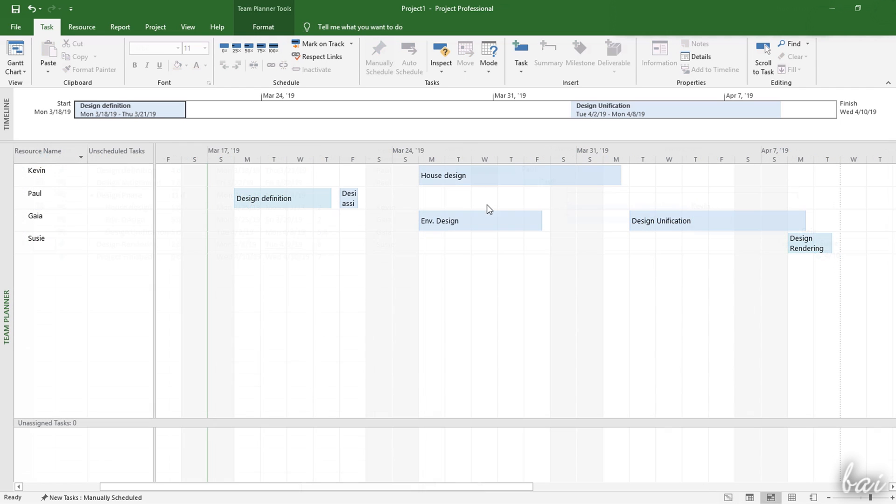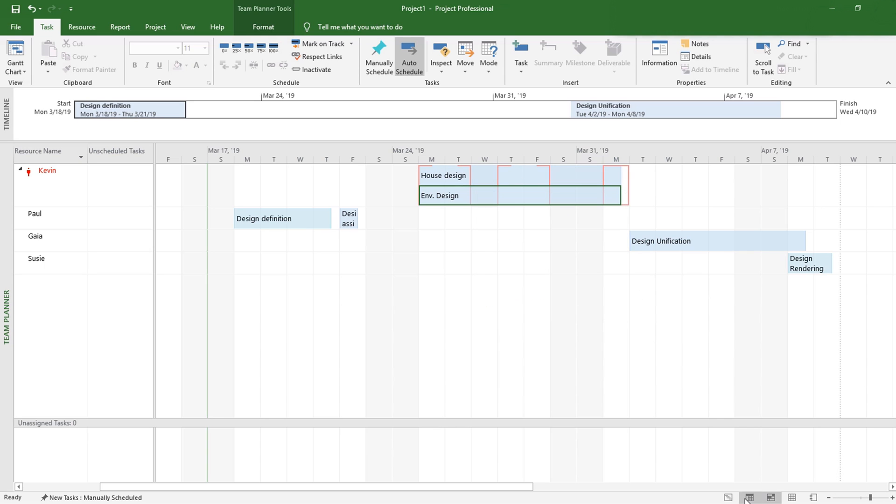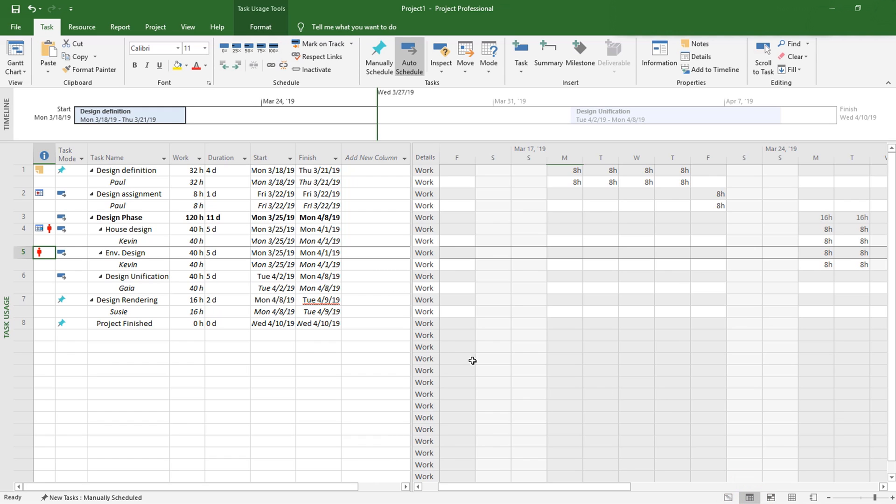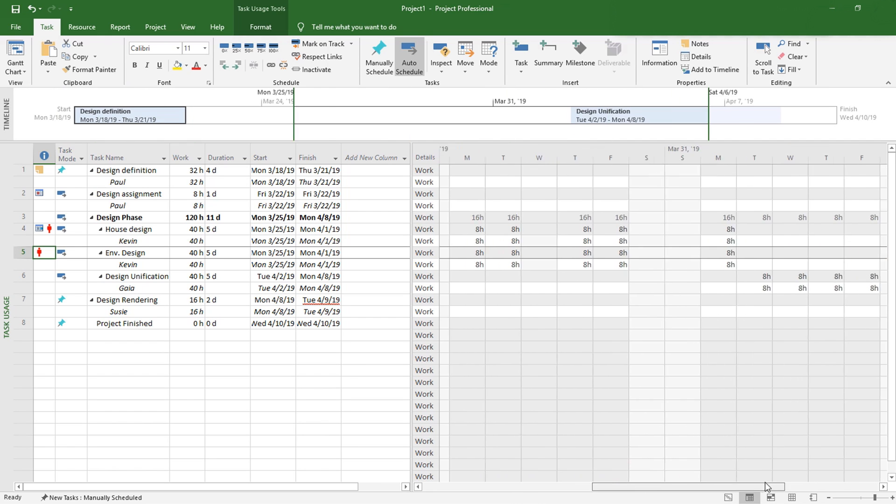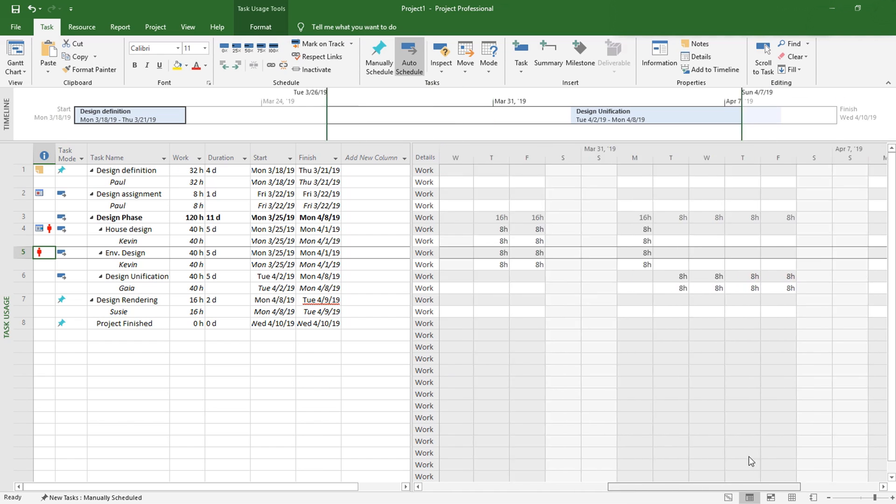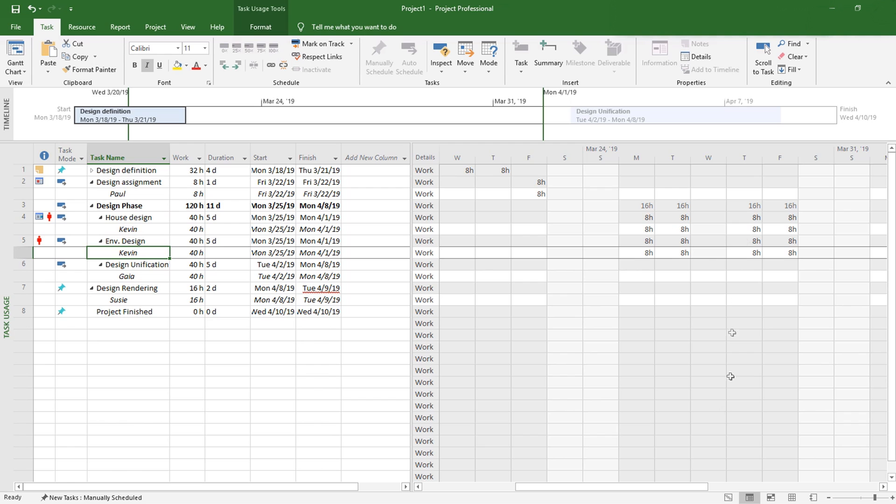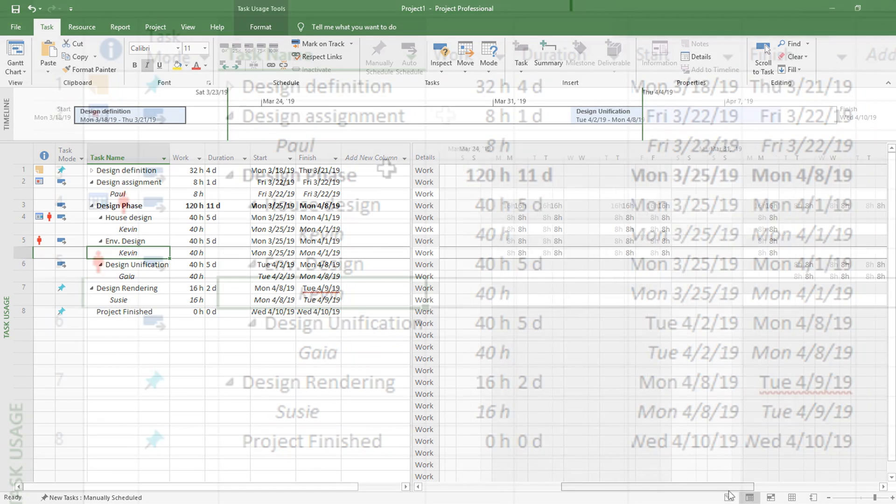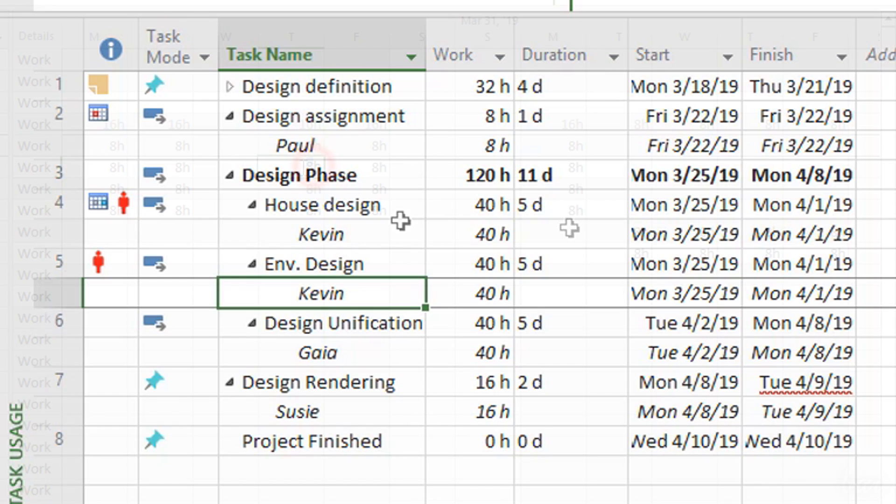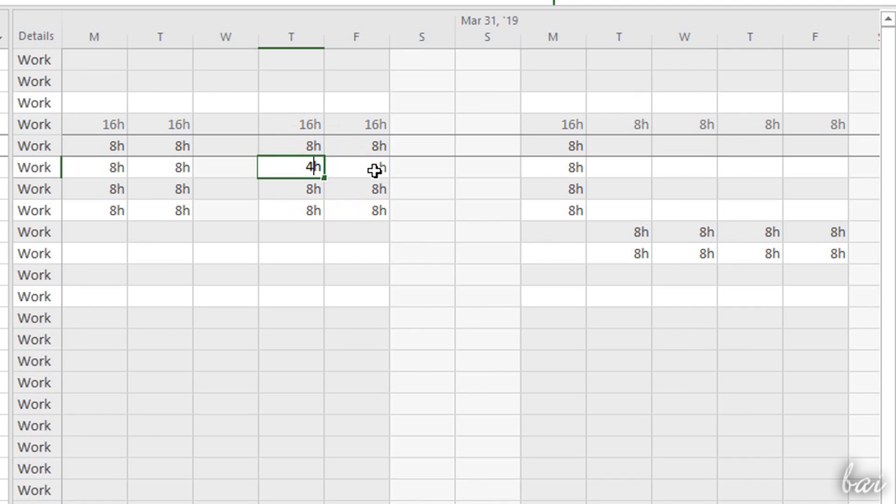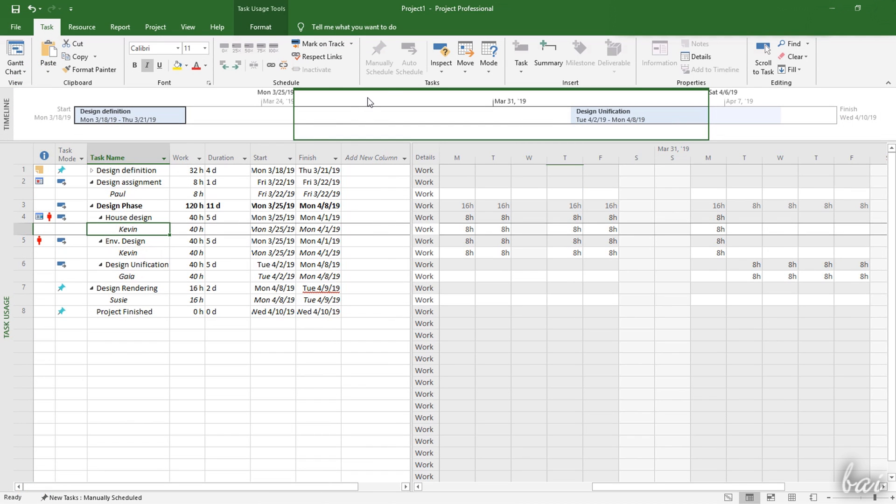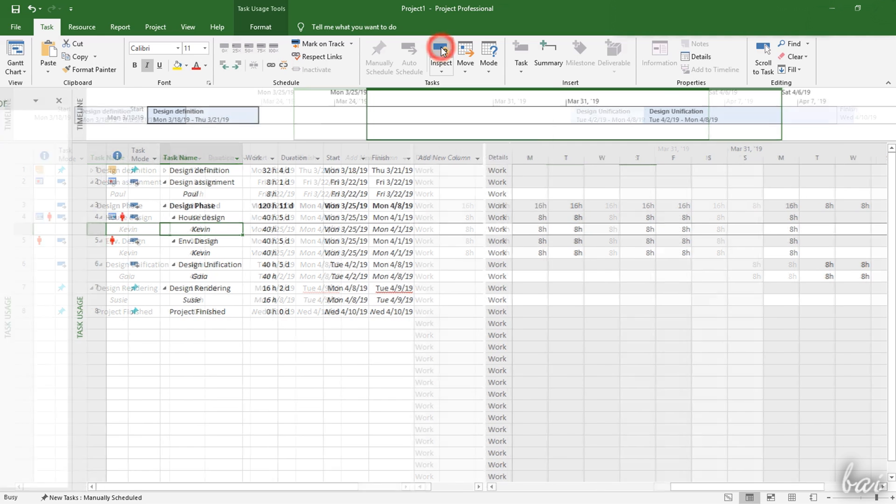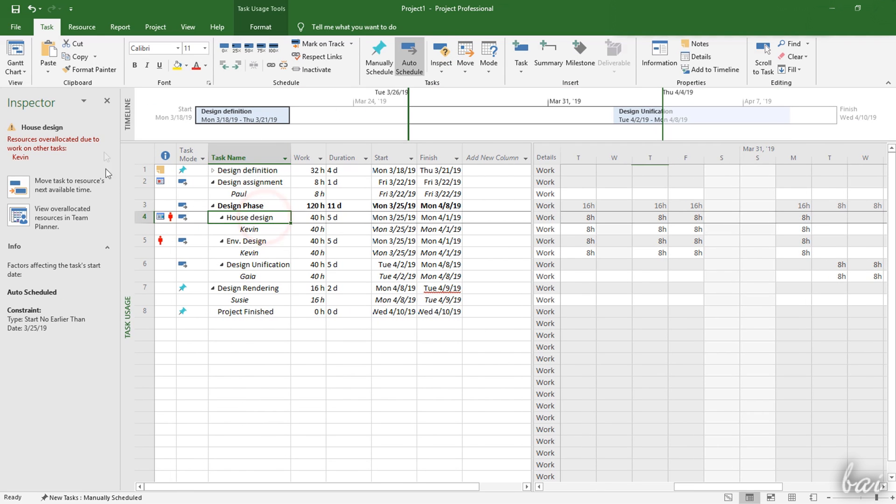In case you make bad assignments, for example when tasks meet holidays or when over-allocating resources, red contours appear. The over-allocation can be resolved by using the Task Usage workspace. This workspace is used to distribute the tasks between the resources, considering the limits defined for the weekly and the daily working hours. In case any resource does not respect the limits, these will be marked in red as over-allocated on the left side. You can resolve this by either changing the task distribution in hours on the right, or using the Inspector panel to apply suggestions from project. This can also be used to apply automated corrections on other workspaces just seen.